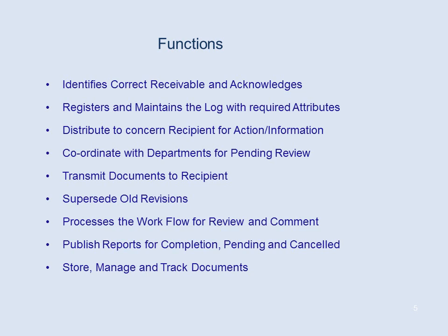Coordinate with department for pending review. You have sent the documents and now you have to match with your log what documents are pending and what date they should come back, so that the cycle is completed in given time. What is given time? Every document workflow is given one particular time, say 4 days or 7 days, and it should come back to originating department for further action. So what DC does, he regularly checks what is pending for review.